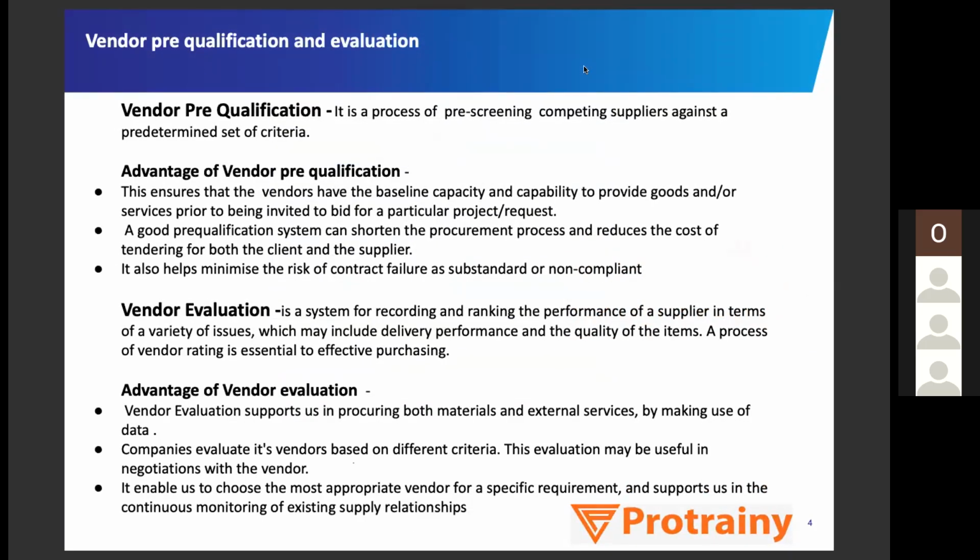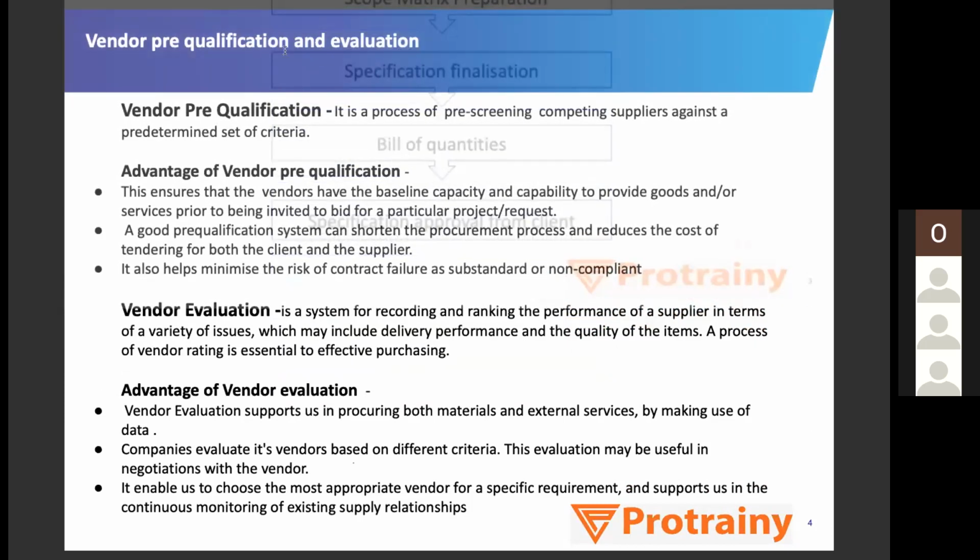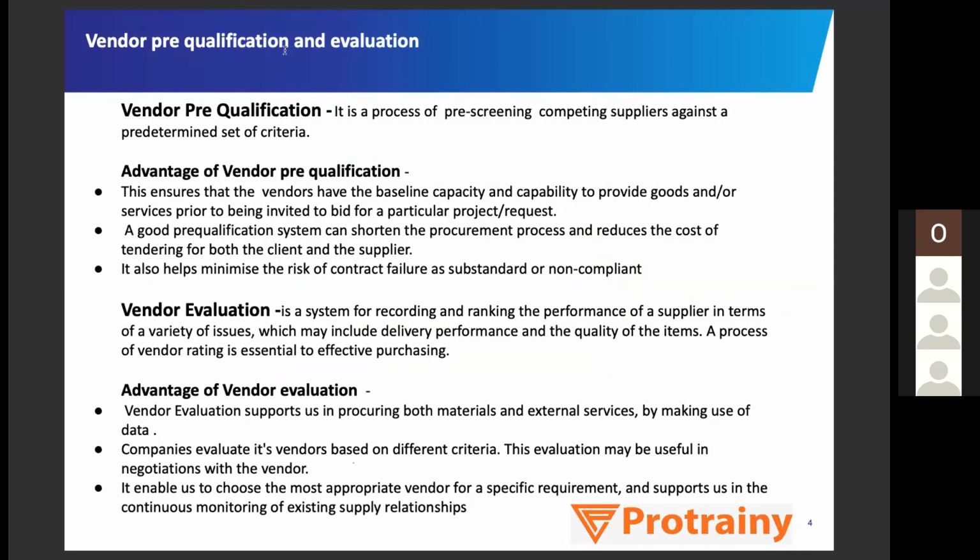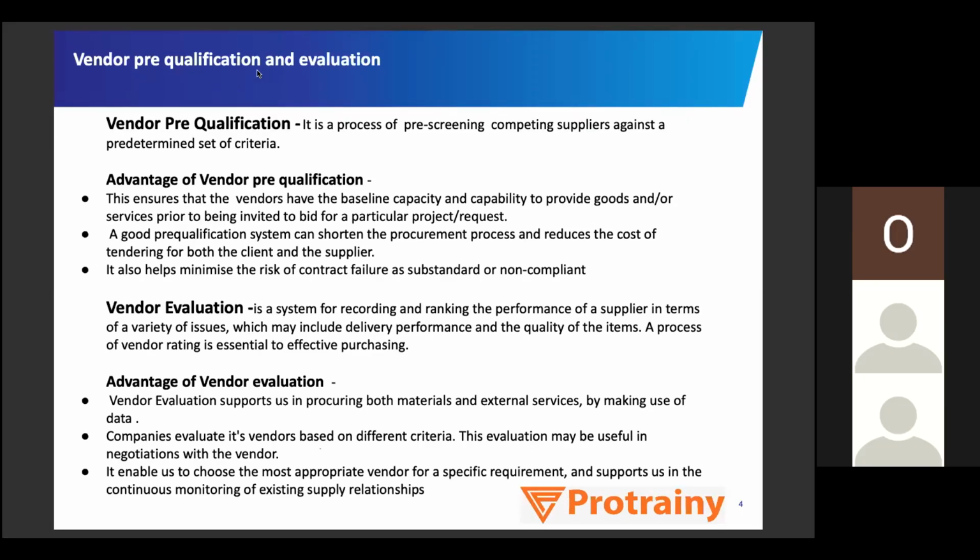So I consider that vendor pre-qualification and vendor evaluation is one of the important steps involved in that standard process. Pre-qualification, as the word tells, is a kind of pre-screening. We have some standards already set, and we check the suppliers against those sets, and if they qualify those standards, then we consider them for our project site. So that is vendor pre-qualification. As I told you, I consider this a major step in the process. So there are some advantages of this pre-qualification.